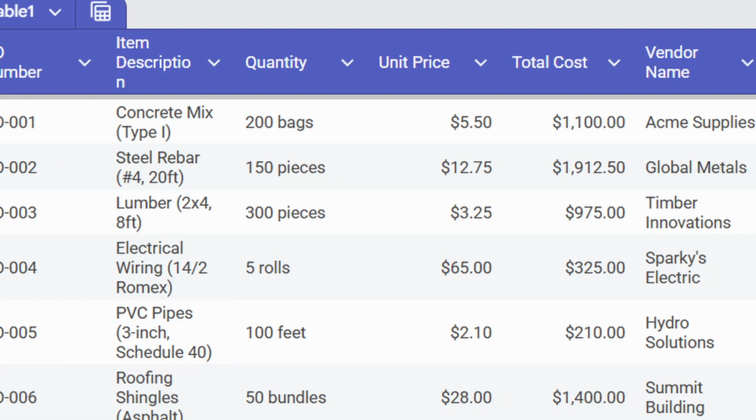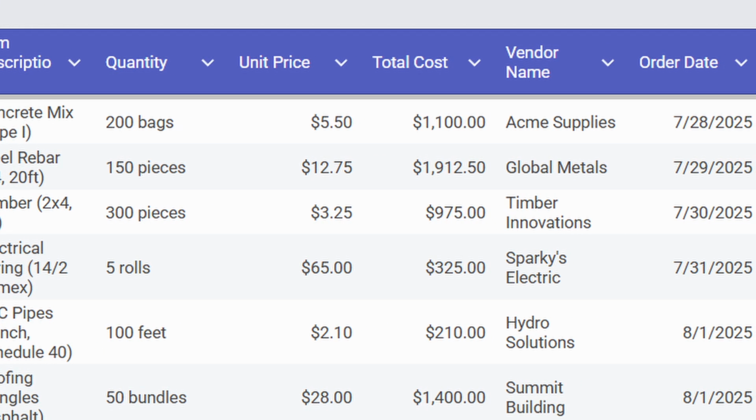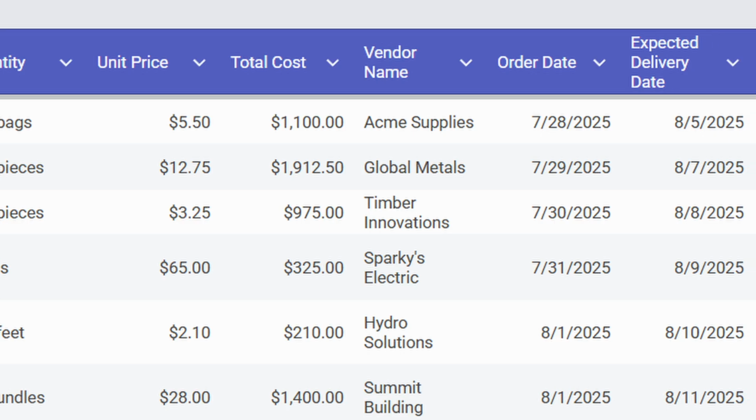So in the building process, first thing you want to do is define all the materials that are going into the building and who's going to install them, right? So we would do that. And the second part of that is verifying the lead times. How long does it take for those materials to arrive once you order them, right? I then built it into my schedule.